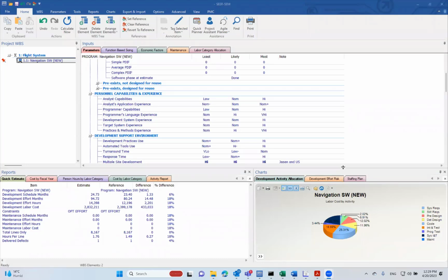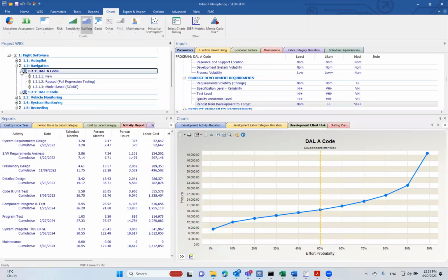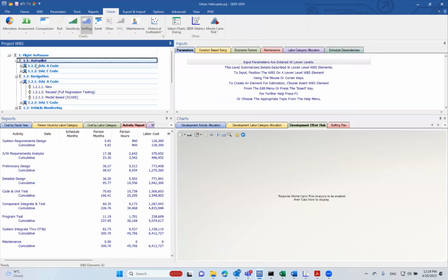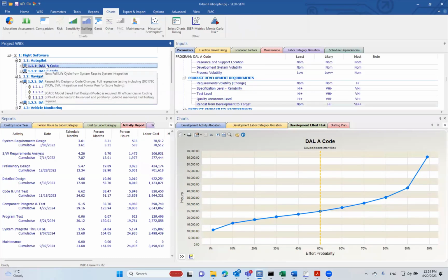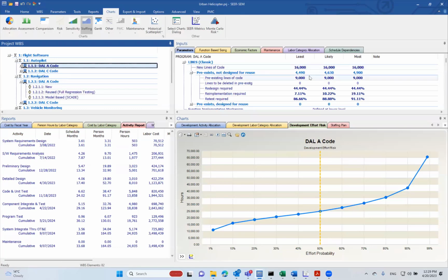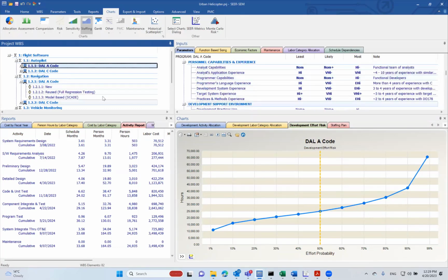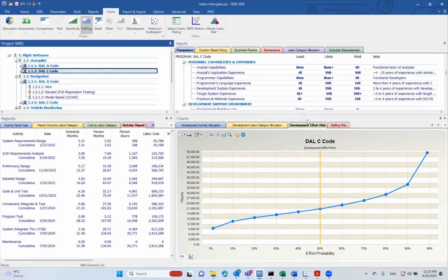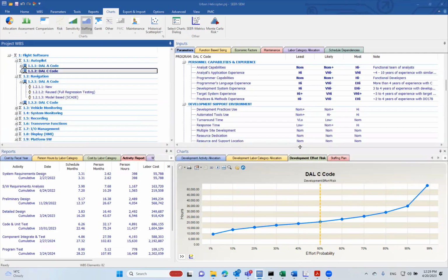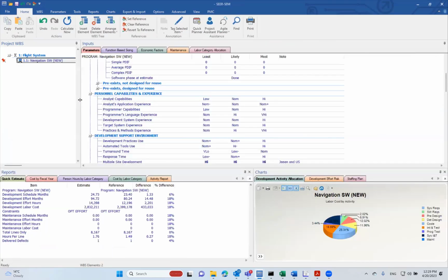If your project involves several or more work breakdown structure elements, you basically repeat the 3-step process for each element, okay? So to get to something like this, get to this one, for example, I followed the same process for this element and this element. I created the element, selected the knowledge bases, entered the size, and fine-tune any parameters. And I followed the same approach for each of these elements. So after this, it becomes just a repetitive 3-step estimation process that you would follow in SEER, okay?